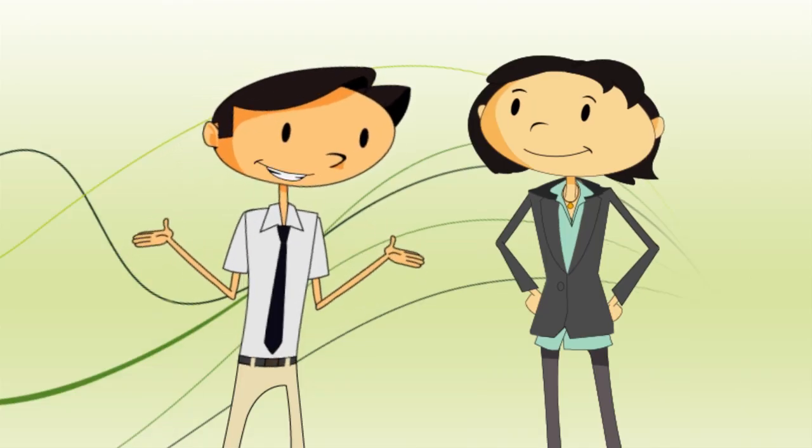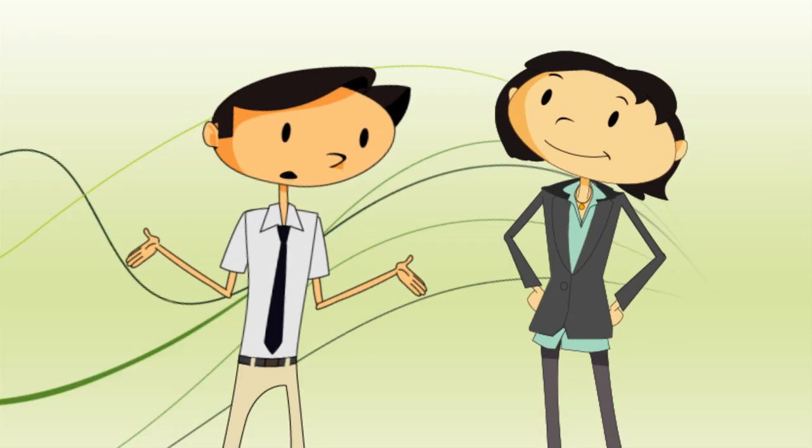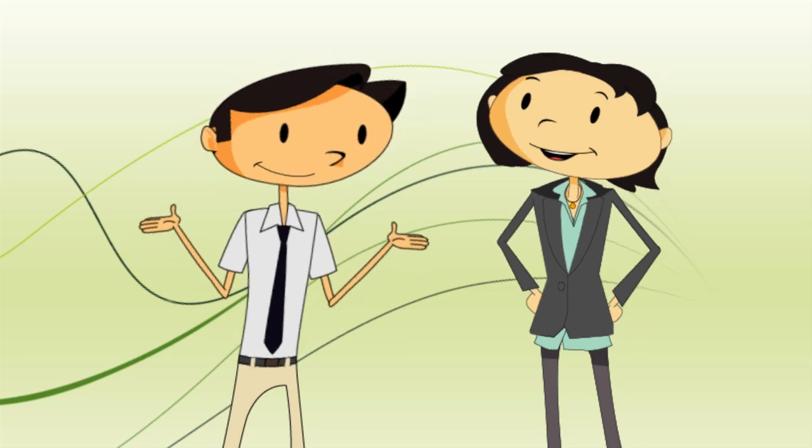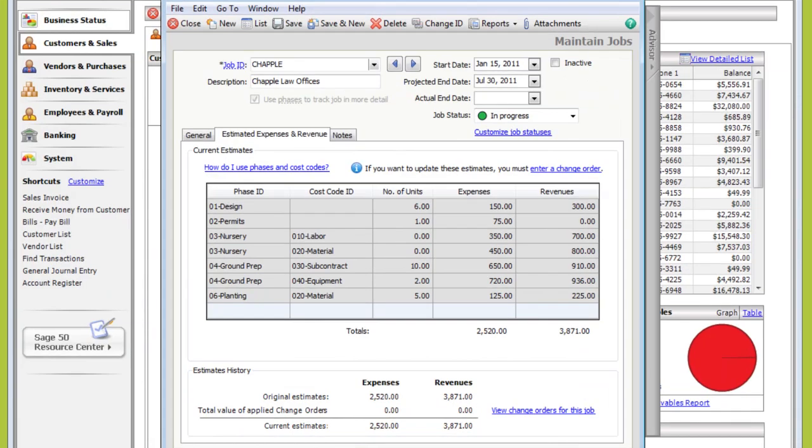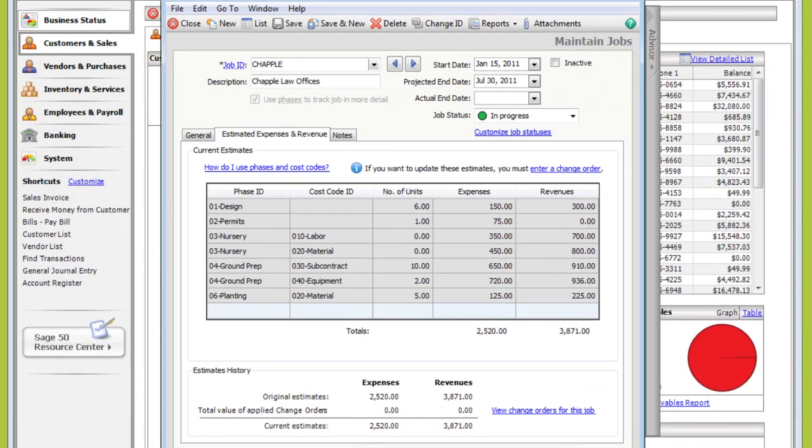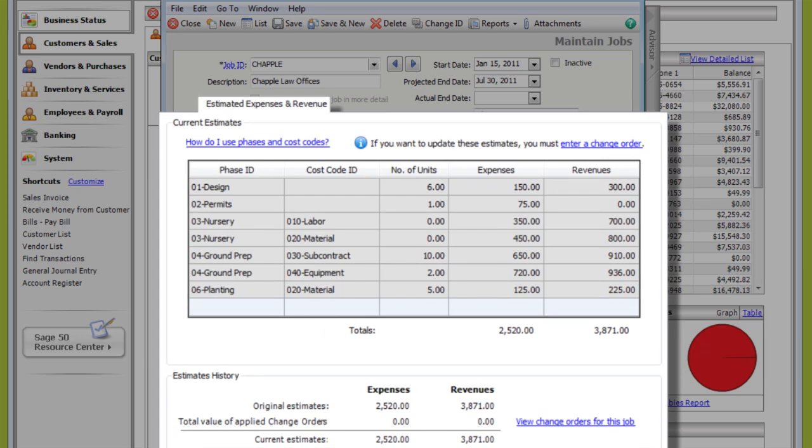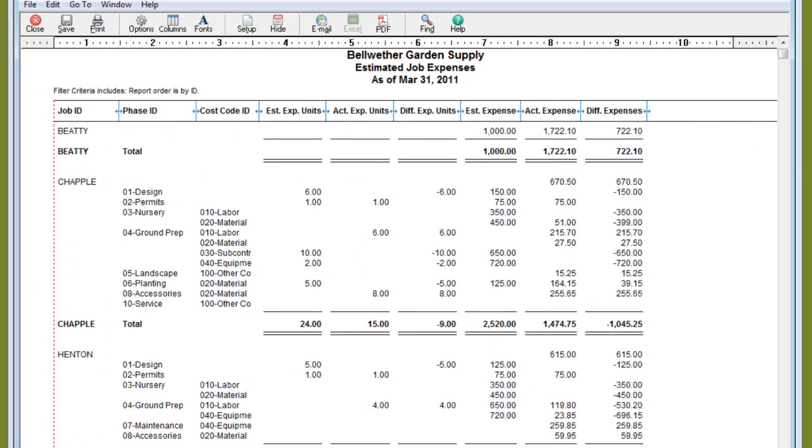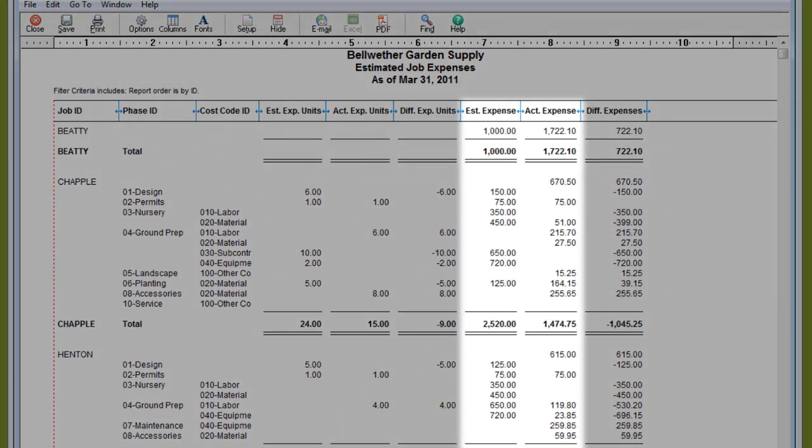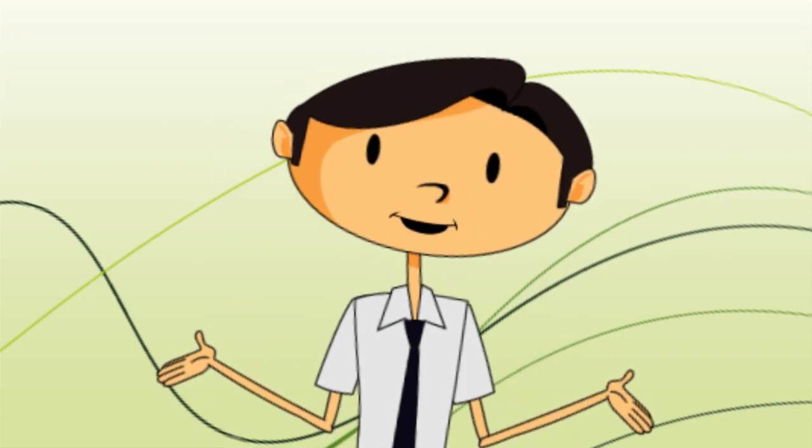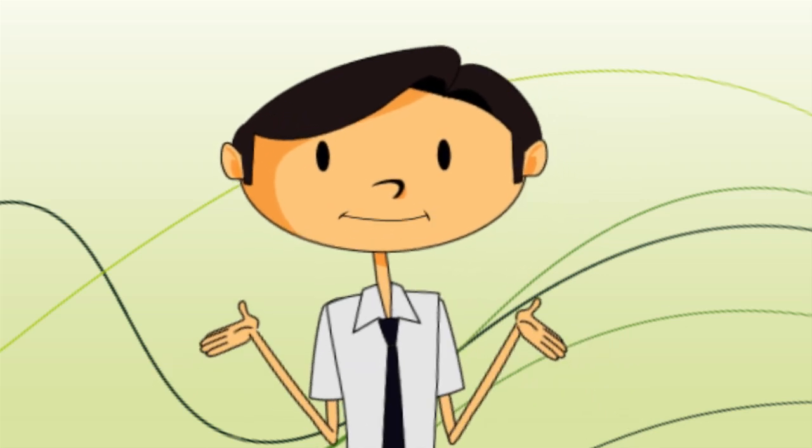Is there a way to compare the costs of current projects with similar jobs I've done in the past? Sure. When you set up a job record, you can enter estimated expenses based on actual amounts from previous jobs. Then use the estimated job expenses report to compare estimates with current costs to stay within budget. Yeah, being over budget would be a disaster.